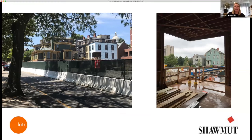If somebody had, yeah, well, and maybe Jeff has his own opinion on the scheduling. I'll remember it well because it was early April. They called us in to kickstart the project and said, okay, well, normally I would advise them we probably need 10 to 14 months to really work through the design and the details. So we started in April. They said, well, the building's moving in September, so get cracking.